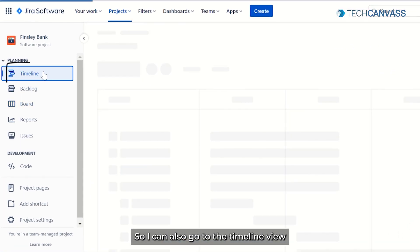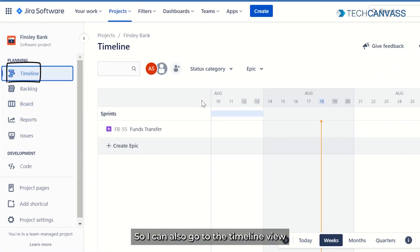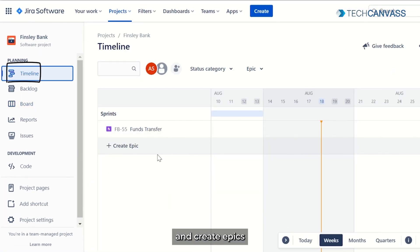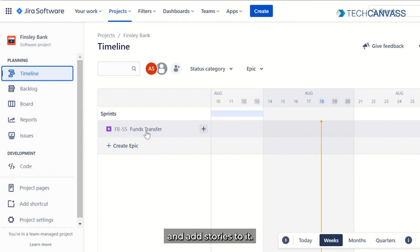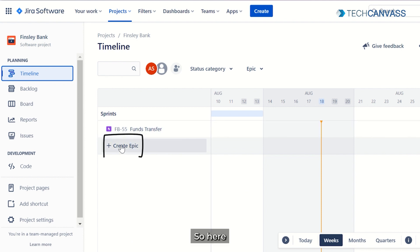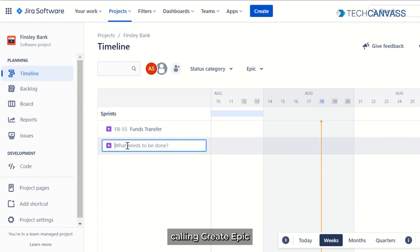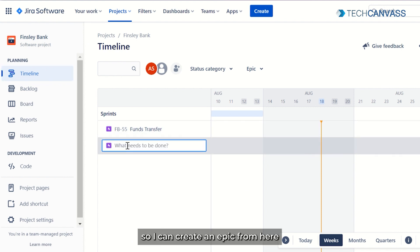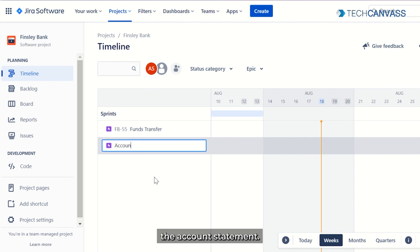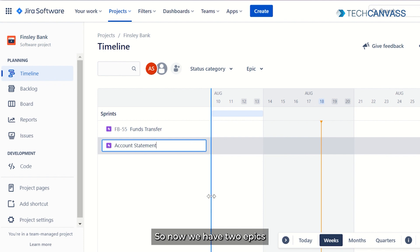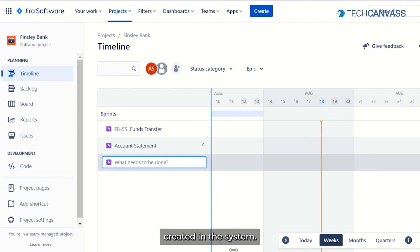I can also go to the timeline view and create epics and add stories to it. Here you can see an option called 'Create Epic.' So I can create an epic from here as well — this one for Account Statement. Now we have two epics created in the system.